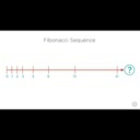This card was added to your decks as a way to signal items that are simply too large to reasonably estimate. Feel free to throw this card whenever you encounter an item that you feel the team doesn't know enough about to estimate, and you feel that either it needs more discussion or even that it needs to be broken down into smaller items that are then each estimated individually.